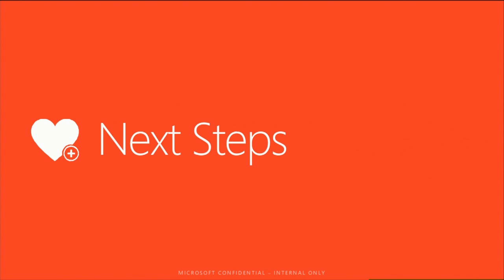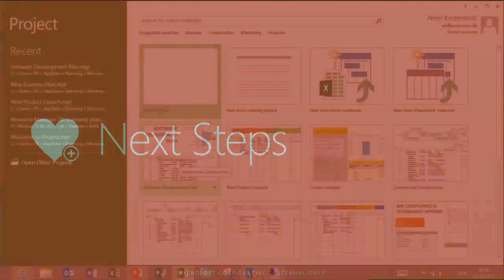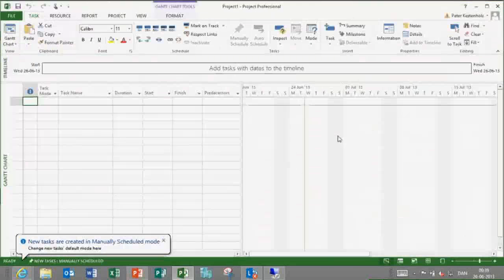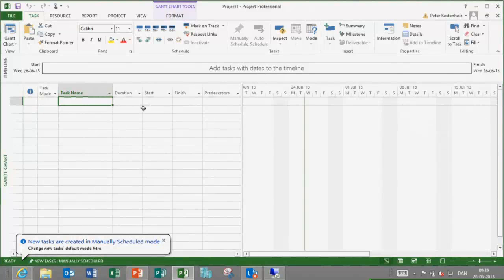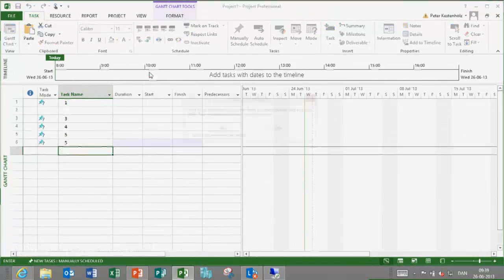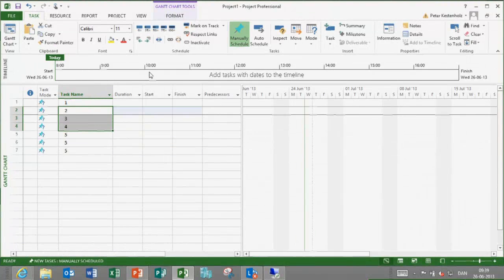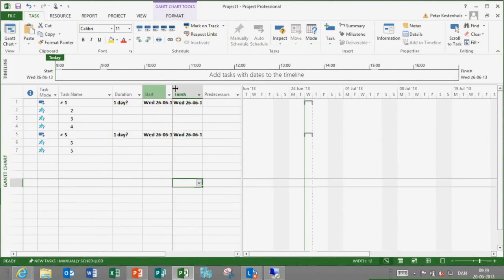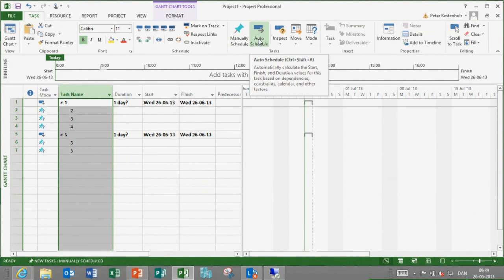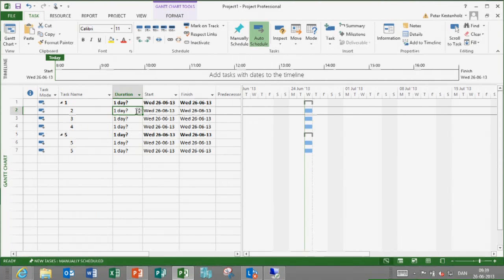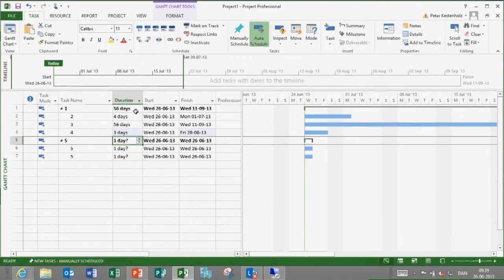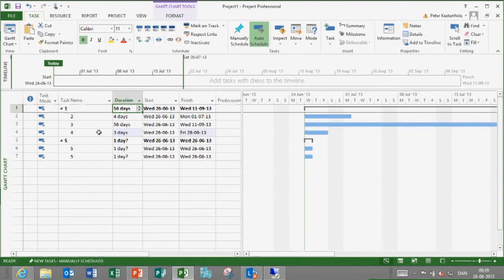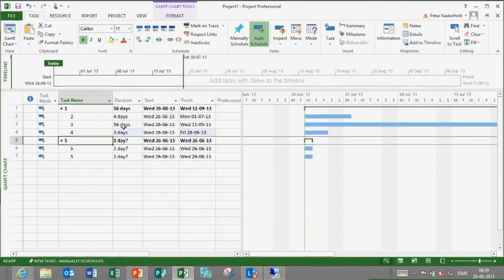Yeah. But another thing to add to that, because many people ask this, is that you need to know that the top-down approach, which is what many people would love to have, is actually an option within the client, so you don't have to do the bottom-up planning like you maybe are used to. If you haven't worked with 2010 or don't know about manual or auto-scheduling, auto-scheduling means that you have to start from the bottom, like this, to build up a phase, whereas in Agile or Scrum, you would start with the phase, perhaps, and then later on find out what should actually go beneath the phase.